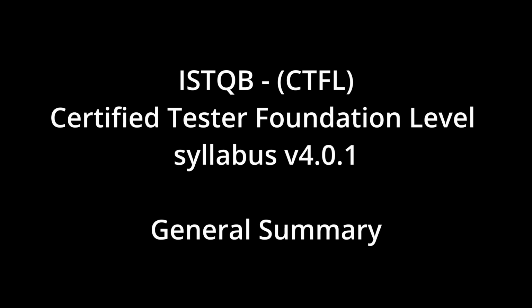And the approach. Yes, the detailed test approach is core. This covers which test levels and types you'll perform, the techniques you plan to use, the deliverables you'll produce, the entry and exit criteria for various activities, the level of test independence required, the metrics you'll track, plans for test data and the test environment, and any planned deviations from the standard test strategy. And of course, you need budget and schedule information.